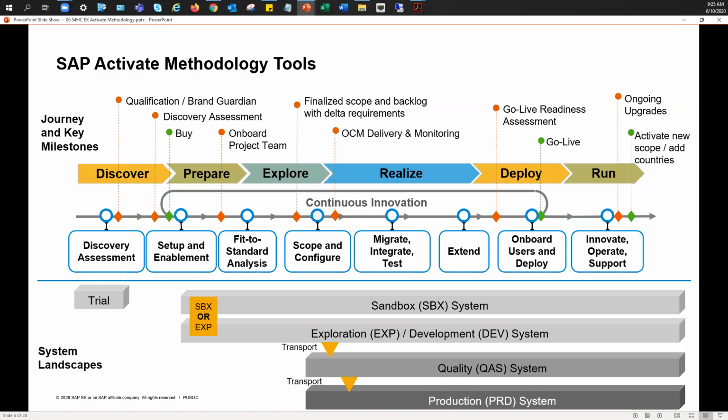Something that you can account for in the discovery assessment is when scope items will be released in phase 1, 2, or 3. There's a drop-down menu where you can select this scope item. We're going to roll this out in phase 1, 2, or 3. So it's a multi-phased approach of rolling out the solution and having small wins: configuring a chunk of functionality, having end user acceptance testing, and then releasing it, making it available. So it is an incremental rollout over time.